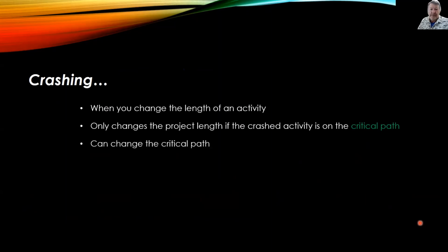Third one, it can change the critical path. Didn't in the last one, but it got rid of a whole heap of float time, didn't it? Well, that's a win too. That tightens everything up. Next one, it's used to help reduce the float time, as we just saw, and or minimize the cost. All right.